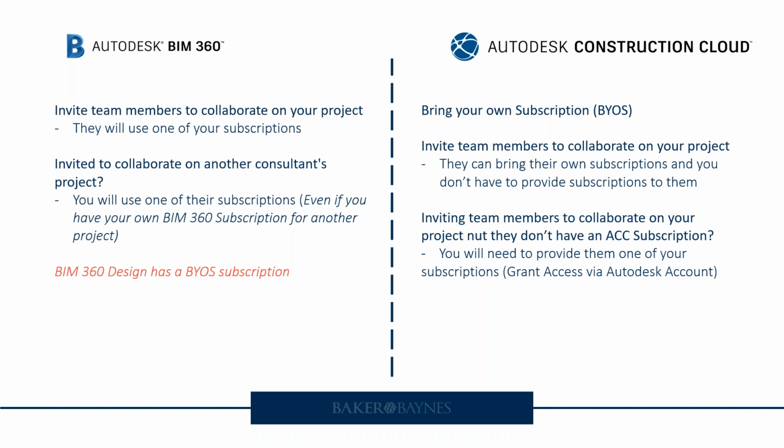In other words, if you invite team members to collaborate on your project, they can bring their own subscriptions and you don't need to provide subscriptions to them. So if you are 2 people in your office and you are collaborating with 5 different consultants, you only need your 2 subscriptions. You don't need to provide licenses to your consultants. They can bring their own.